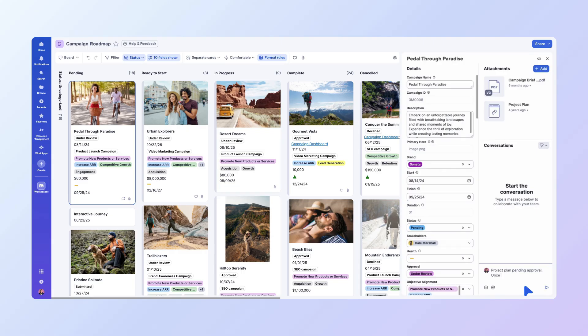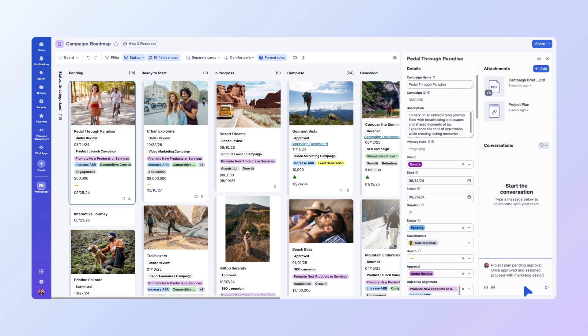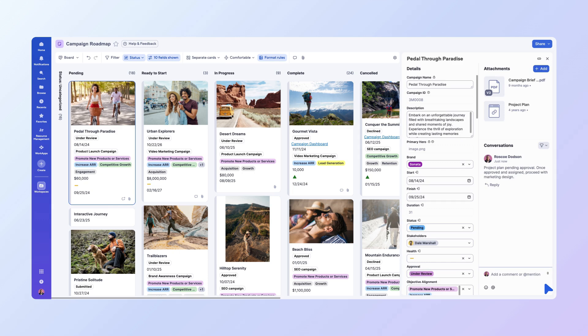You can add a comment to a card to explain why there is a delay so that people with access to the sheet can have status updates as you prepare for your review. To add a comment, open the card, and type your message in the conversation section. You can even attach relevant files to a card, keeping all project-related information in one central location.